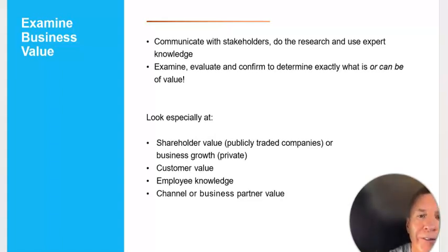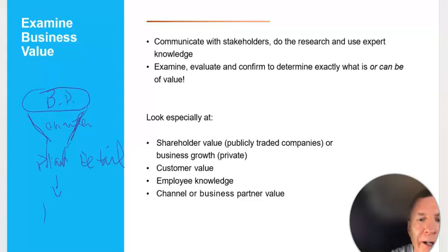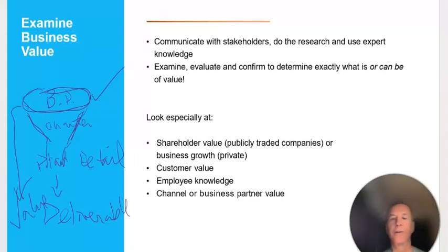So as you recall on a previous slide, I mentioned that at the C-suite, they're going to have business documents. And so business documents are what they should give you, the vision, mission, strategy, and that you're going to refine those in terms of building a project charter, 1 or 2 pages that kind of narrows down but stays with what the company wants. Then you're going to do a plan, which is the detail. And as a result of that, you produce a deliverable of some sort, right? This is the process. The company wants this, and this is the value that ties them together, right? Because you've ensured alignment from the top all the way down to the deliverable. Pretty exciting.